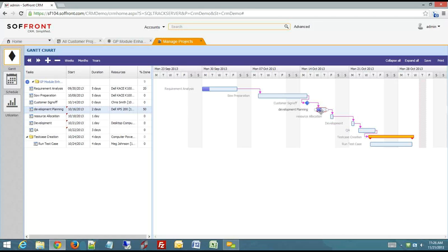which project, and this is a completely drag and drop environment where I can move and adjust my project very, very easily. I can click and move my timeline, reorganize my timeline dynamically in a completely drag and drop environment. So as you can see, I just moved a couple of tasks around, and immediately on the left-hand side, those changes are reflected on the red icons. They're indicated by the red corners, and these are the tasks which got affected when I moved things around on the right-hand Gantt chart.